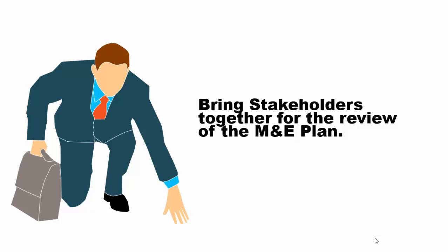So you've written your M&E plan document using the template that I shared with you. But I have to mention that that is a pretty basic template, believe you me, because for bigger interventions, you might need something much more elaborate. After you've drafted the M&E plan, the next stage is to invite all the stakeholders for a meeting where they can review this M&E plan. Or maybe at this stage you don't need to really invite them. Just share the draft document with different stakeholders.